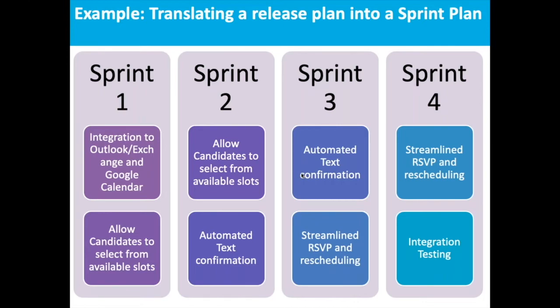And then you also want to make sure that all the different issues and bugs that were identified during the entire release process are prioritized, and the high priority issues and bugs are actually fixed as part of the hardening exercise. And that's when your feature list is complete for that particular release. I want to emphasize that the feature list is complete.